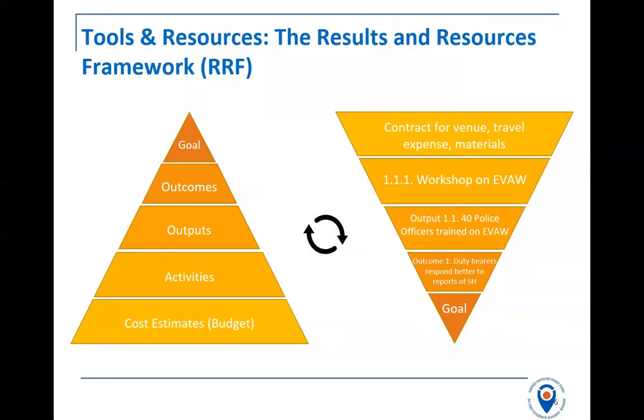This is important because we ask you to link all payments to project activities. Filing your documents for each payment by activity number will facilitate the preparation of your financial reports and also compliance with audits, because every expense must be attached to a project activity.